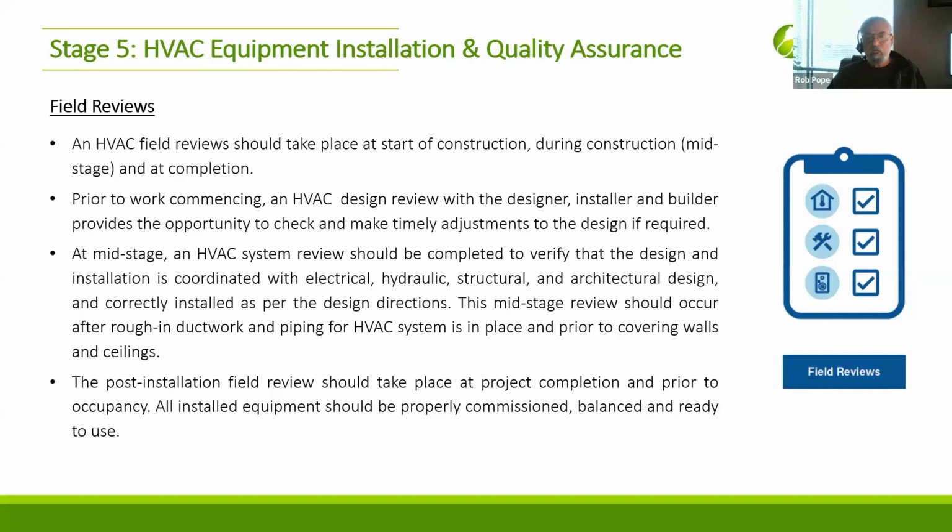Field reviews. So you got the design, you install it all. Somebody has to go and look at it. Ideally, there's a separation between the designer and the HVAC contractor, right? But a builder can do this. An inspector can do this. This is ideally what we'll end up with, is to look at the design on the one hand and look at the installation and make sure that it's following the design.